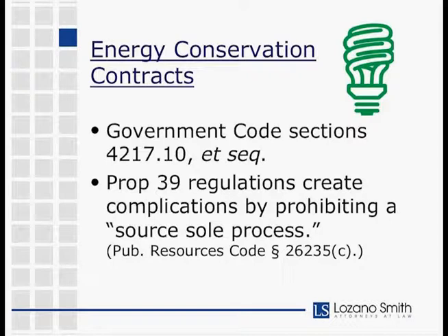However, Prop 39 was somewhat recently passed, and created funding for projects creating clean energy jobs. The legislature then implemented regulations to implement Prop 39, and one of the laws that was enacted is Public Resources Code 26235(c). What that section says is that educational agencies may use the best value criteria, as defined in Section 20113 or 133, for contracts awarding Prop 39 funds, but the district shall not use a sole source process. And there is no guidance in the law as to what sole source process means in this context.